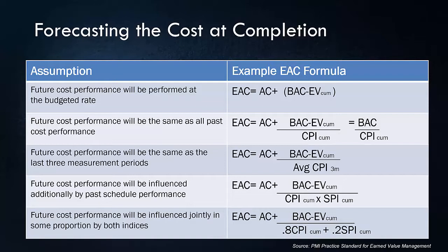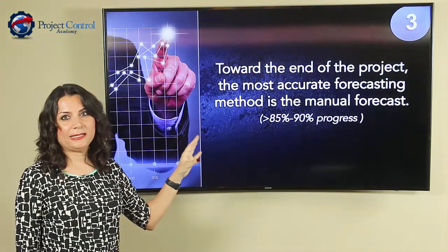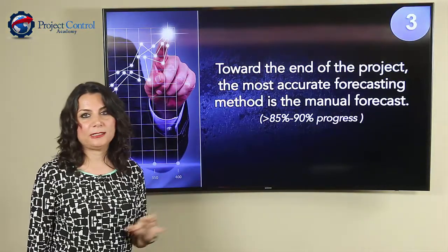And no matter what formula you're using, make sure that you validate your forecast with your control account manager at the end of the day. So although EVM is very powerful, you have to make sure that you check the result of your forecast with the control account managers and make sure that that's the right forecast that makes sense.